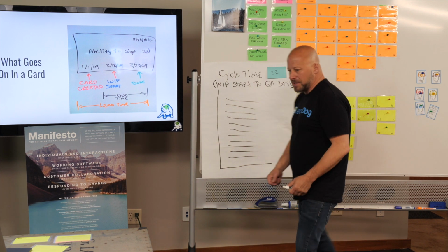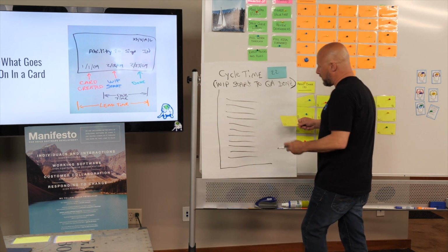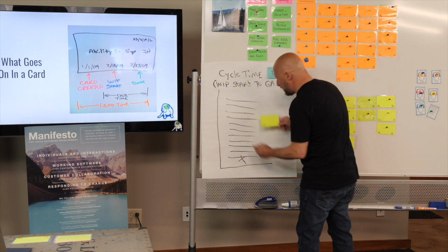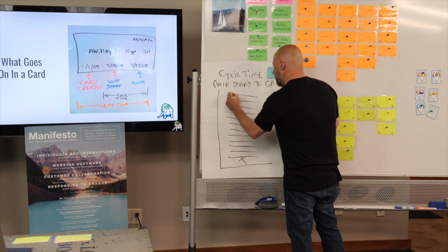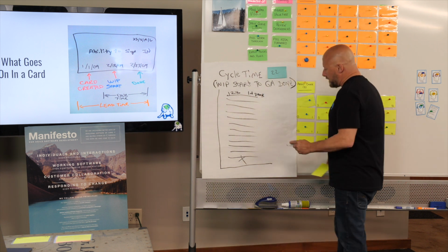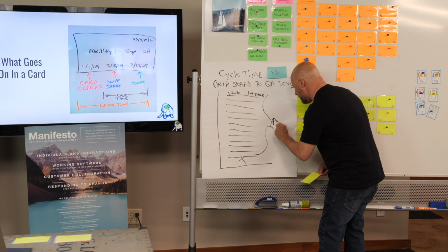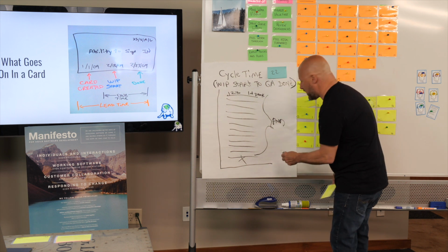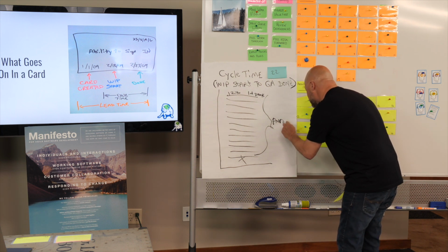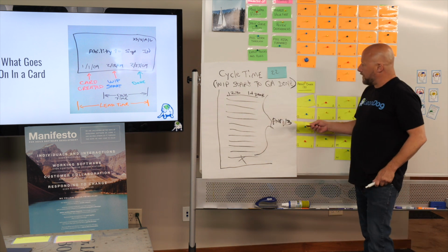So when this card comes in, and it has a date on the bottom now, I take the card, I go over here, I delete this data point, I add a new data point, card number 123, took 14 days, right, to get done. Now, I'm gonna recalculate, right, my average, and I'm gonna come up with a new average. And I'm going to realize, okay, well, that's decreased our average, down to 13 days now, okay, or increased.